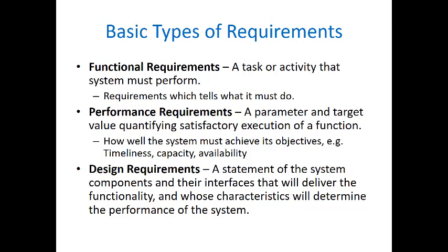So 95% of customers, at least 95%, should find a bike when they get to a station. Some other performance requirements is that from every point in downtown, we should be able to find a station within 15 minutes walking distance. Or we want the chance of accidents using the bikes in this bike rental system to be close to zero. So these are all performance requirements, expectations from the system when it's up and running. This is how well we want our system to perform.